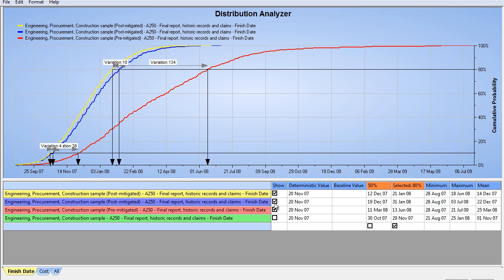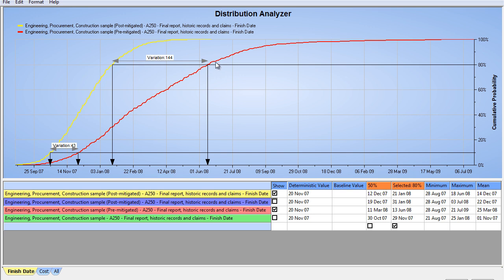final curve, I might just show if this yellow line was acceptable. The red curve was the worst case. I'm showing you the worst case so you know it's real, you know it existed. But I'm showing you the yellow line because we gave you a path forward, proactive steps to save you 144 days. So I know the other example was unacceptable, but right now, based on what we're seeing, we can save you 144 days. Now, the report may say, hey, we need to save an extra 50 days though. However, at least I can go in and say I've given you proactive scenarios to save 144 days.